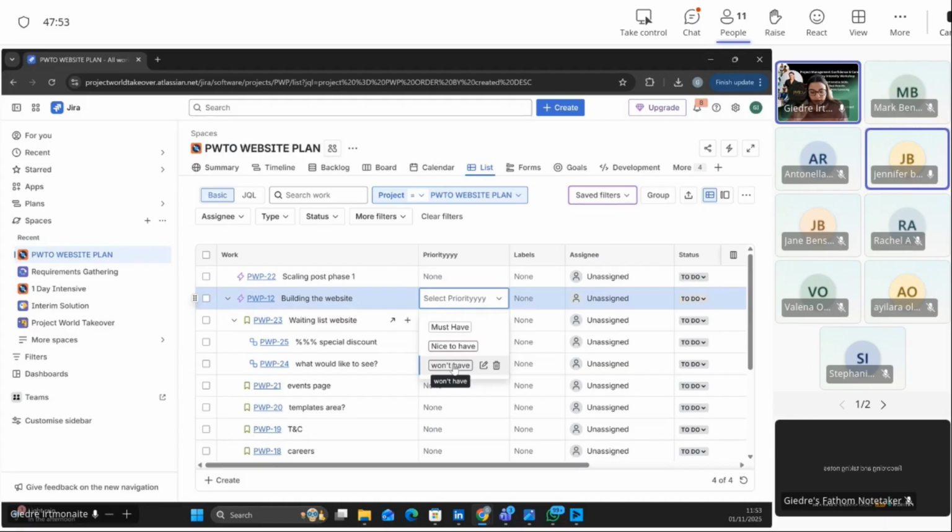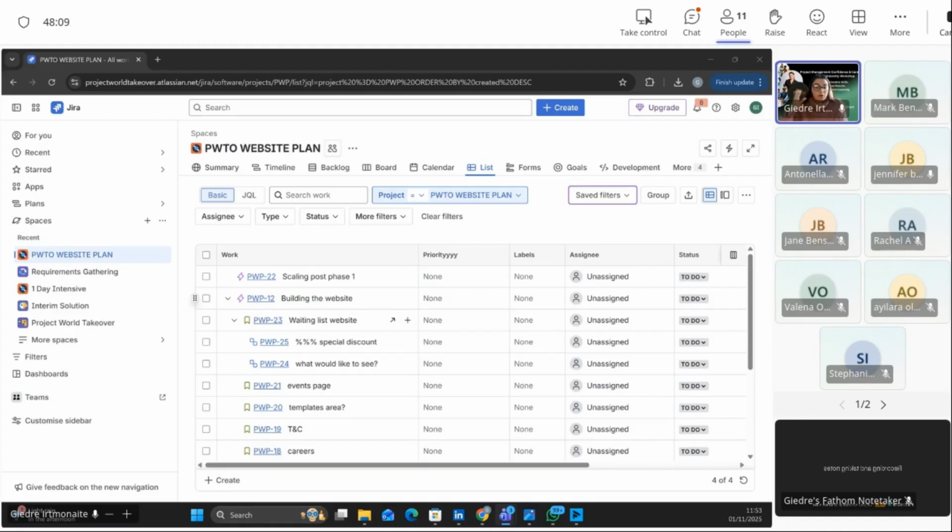We actually also do that for projects as well. When they approve budgets, a lot of the projects end up getting cancelled and they don't spend the money because of delays and everything like this. So at one point in the organization, they're gonna have a project backlog of all the projects that did not get to be completed. People will review these and be like, should we start this project now? So essentially your priorities can also shift.